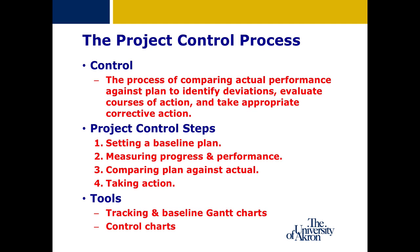A common term and concept in project management is the project baseline. Part of project planning is establishing this baseline. Once you have a work breakdown structure with resources, dates, and costs all established, the baseline helps gauge performance based on actual results once a project starts. It's the concept of comparing planned to actuals. Chapter 13 talks about establishing this baseline, measuring performance by pulling in data for tasks being completed, comparing these two, and taking action based on differences found. The Gantt chart, like that provided through Microsoft Project, is one typical method for demonstrating planned versus actual results.